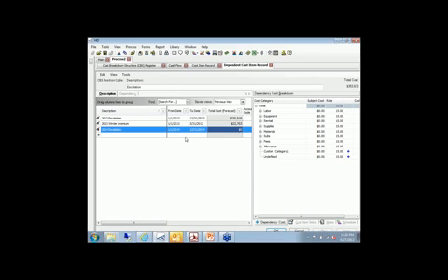So the question is, how do we know that? How does hard dollar know there's no work going on in 2014? And obviously the answer is the Primavera schedule tells us that. So Primavera gives us visibility to when the work is happening, and therefore our cost model can take that into account. And you'll see as we start making some changes, if our schedule gets pushed, more work will move into 2013 and into 2014, and those escalation values will be triggered.